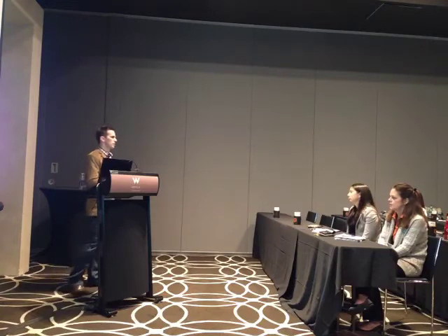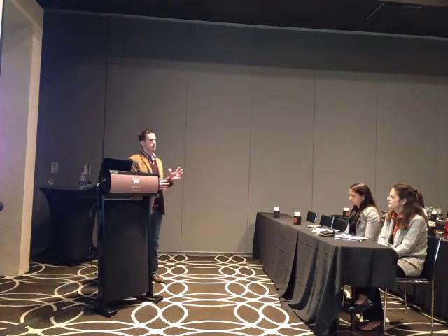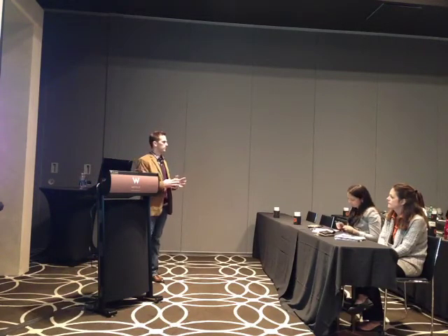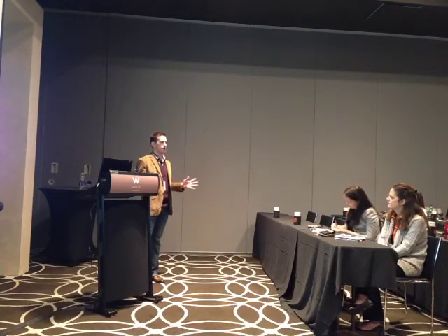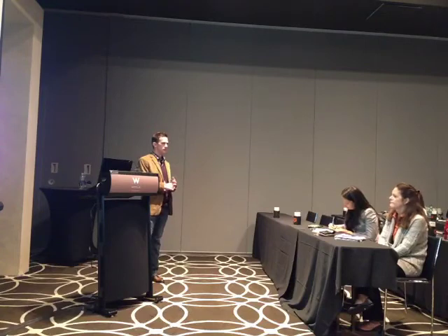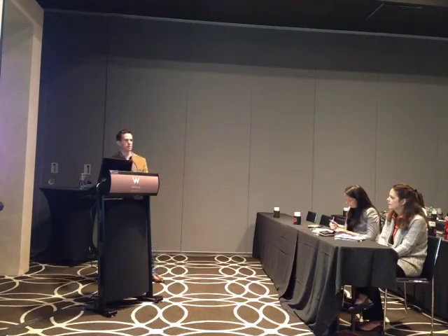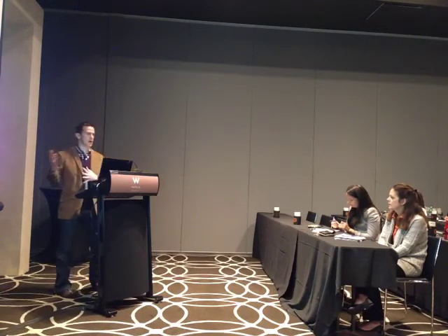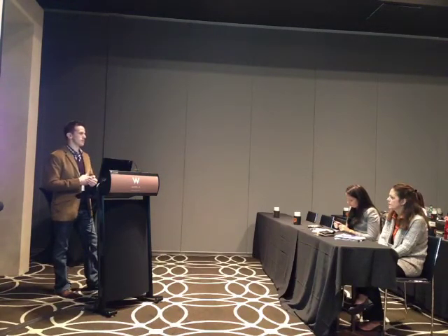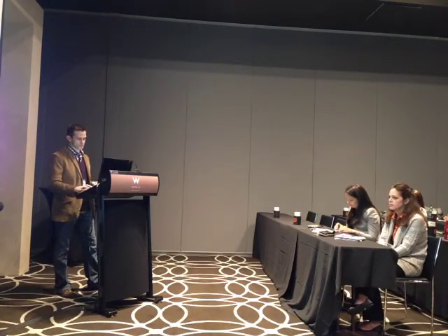So for us, for example, for files, we do not use Central Desktop for source files. And it's known throughout the entire organization: you do not put PSDs or video files onto the Central Desktop cloud server. You put that on the shared network server. The things that go on Central Desktop are final deliverables, and everybody within our organization knows that.